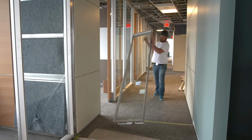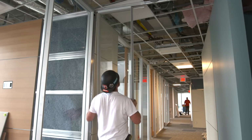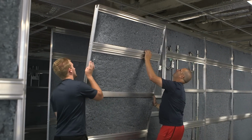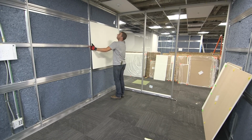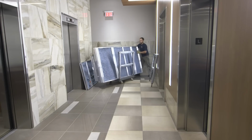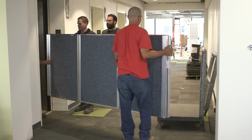We're now finding that our construction costs are typically at or 10% below conventional construction consistently. We have less work to do with drywallers, tapers, painters, and that has been a pressure point for us on a number of other sites, so we don't have any of that here. It's fantastic. Most folks now have done a modular project, but that doesn't mean they've done it below construction cost and on a faster schedule. So those are the things we really focus on.